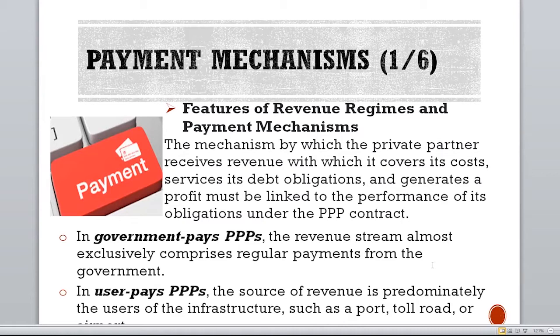Once they negotiate, the agreement might be that, okay, since we are expending 20 billion to achieve this project from our cost analysis, and we envisage to realize a markup or a margin of maybe 40% for our profit, the total monies we should expect from the government should be 30 billion. That means an extra 10 billion. Let's spread it over the lifetime of this project, which might be 40 years or a 25-year project. How much would government pay us each year in 25 years, to make up for the total revenue projections we have put into the books? So it might turn out that 30 billion in 25 years would be maybe 1.3 billion annual payments.